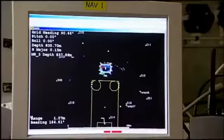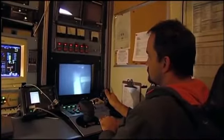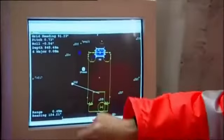It's a tense moment as the team from Hydro gathers to watch the final positioning. It needs to be accurate to within 2 meters. Even after the template is landed, there's still lots of activity going on. The ROV people are eagerly working to close hatches and clean up, remove stuff, and a number of activities. 12.5 hours after starting, the template is securely positioned on the seabed.